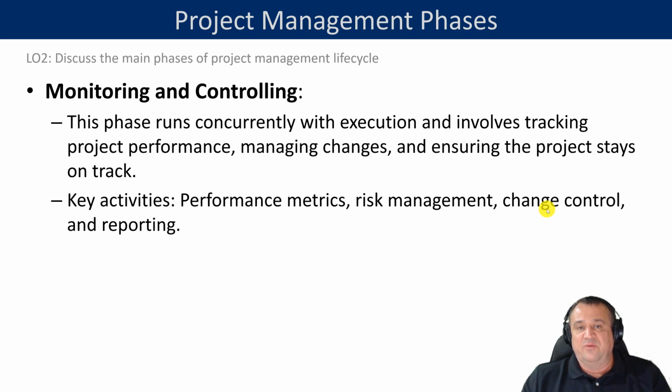Let's say you will change some of the requirements in relation to the software that you're trying to deliver. But that's not as simple as just saying, oh, we're going to change the requirements. It requires an integrated change control management where, first of all, those changes are evaluated by a formal committee. And then once those changes are approved, they're cascaded throughout the entire project documentation and eventually make it to the execution phase.